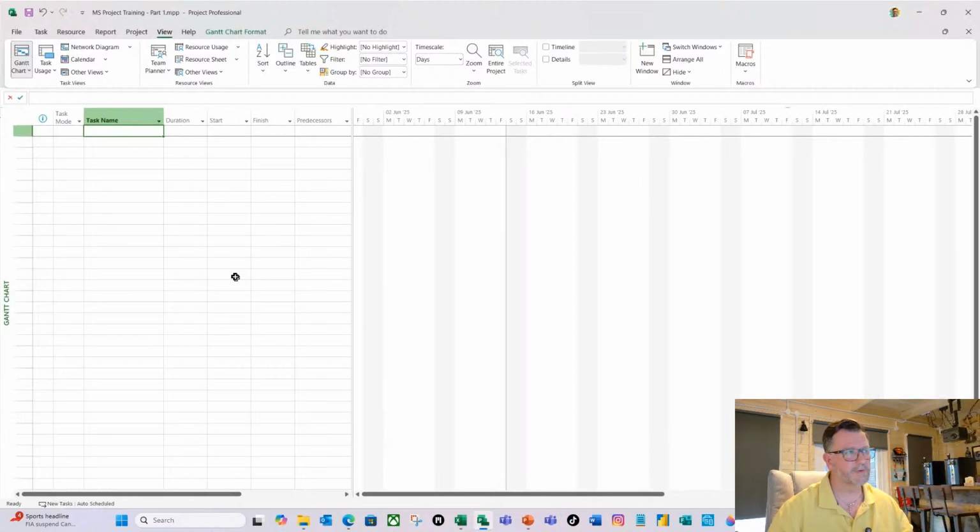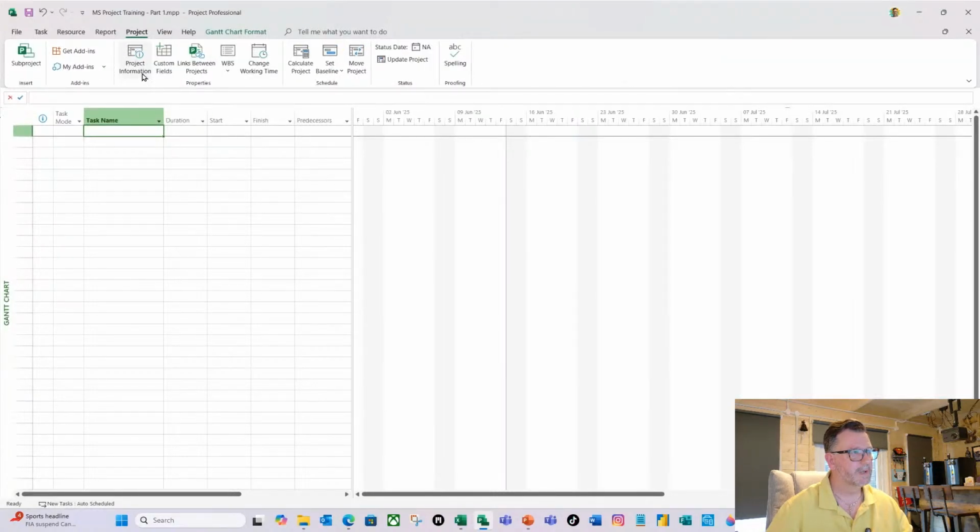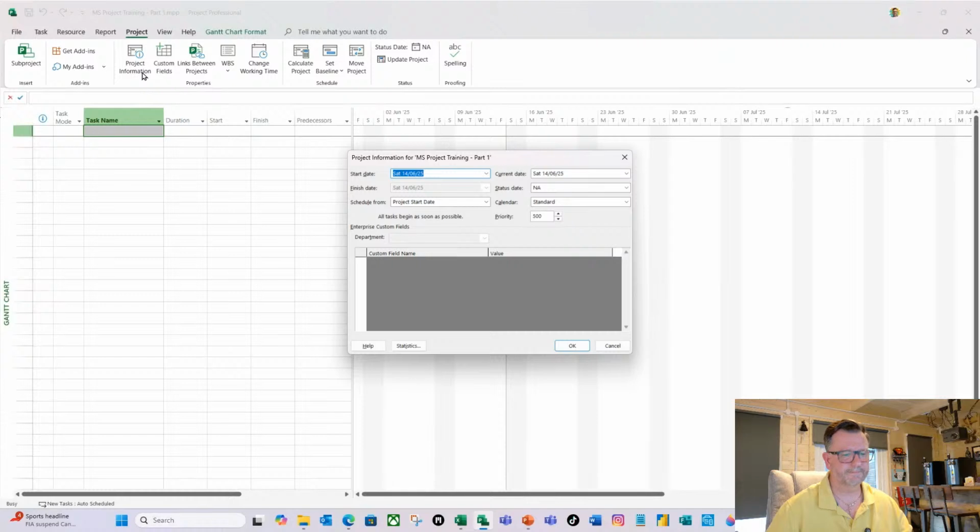But I don't want that, so I'm going to set the project start date. The way I'm going to do that is I'm going to the Project ribbon, Project Information, and I'm then going to set that to the 7th of July. And then click OK.